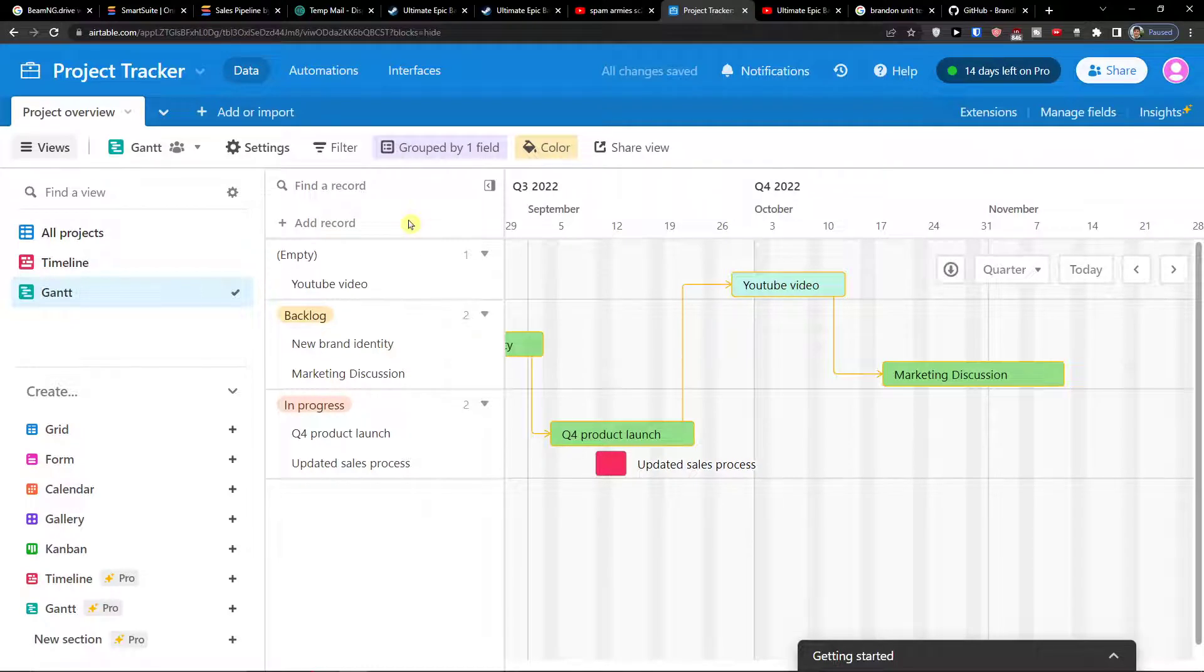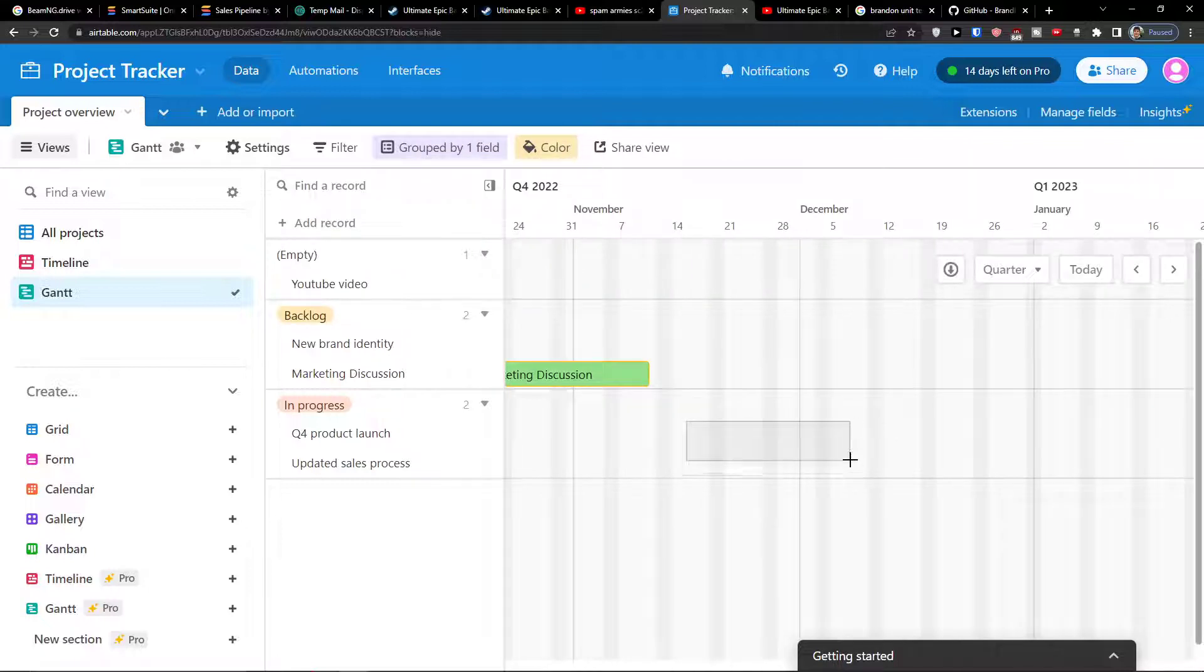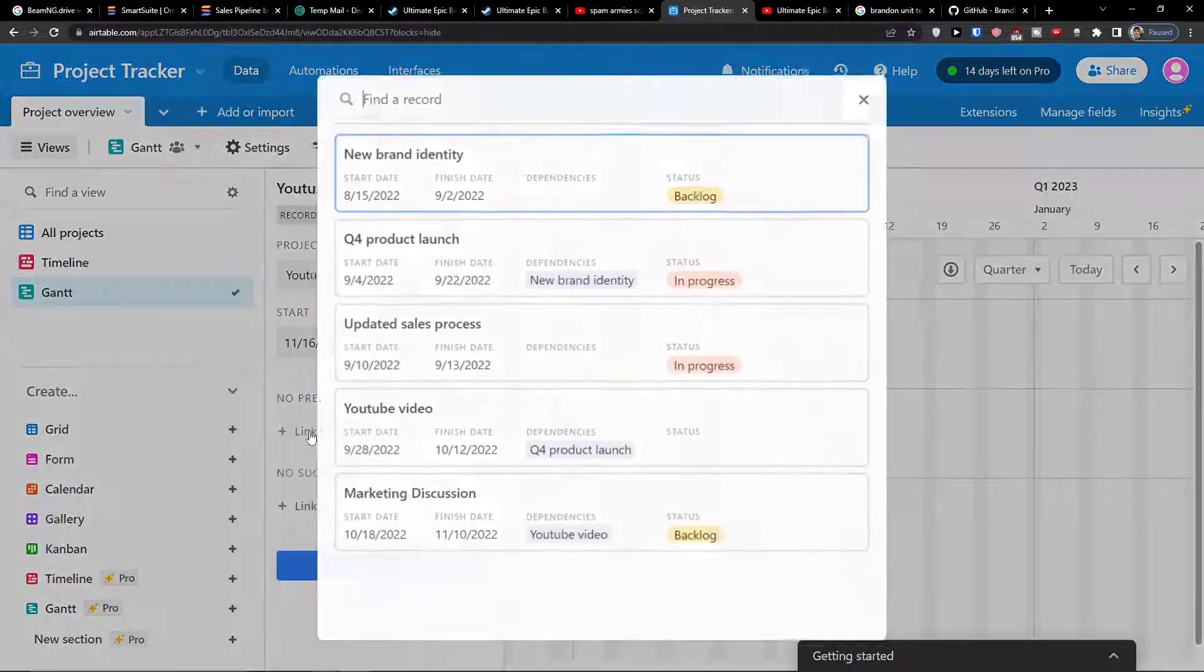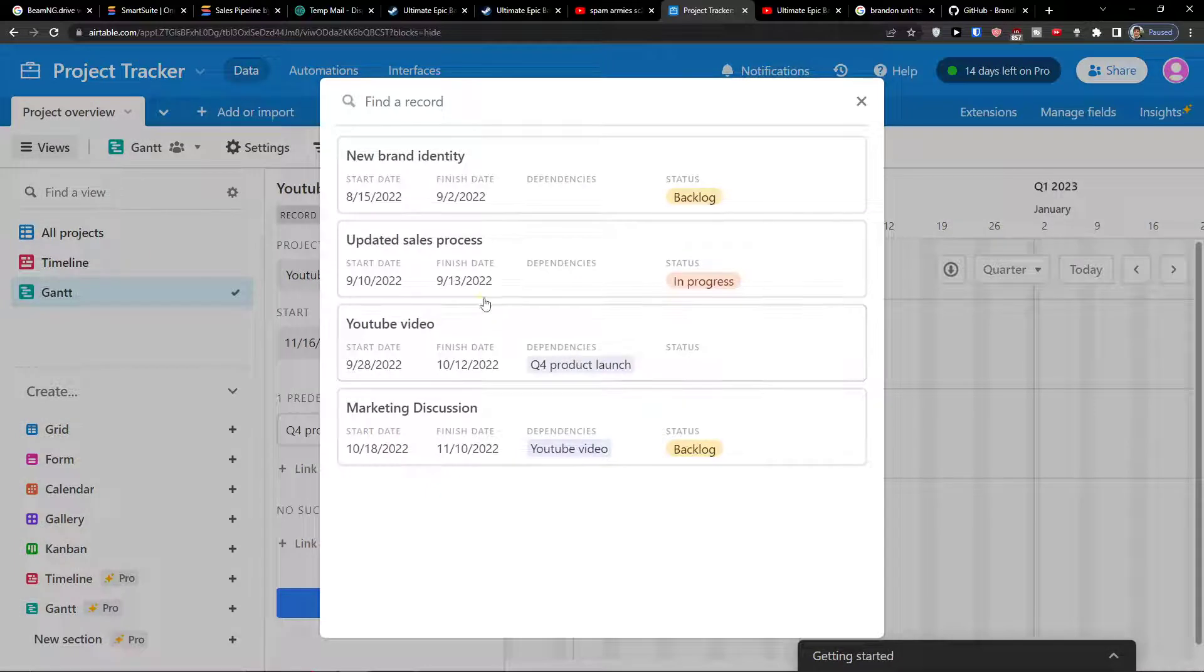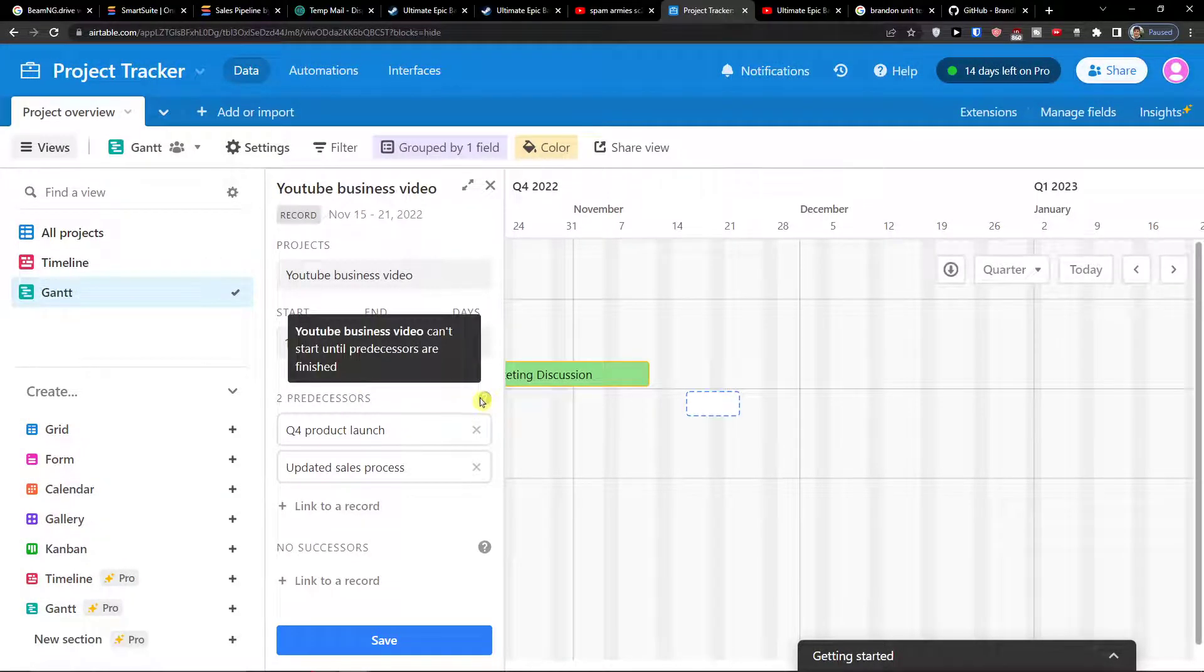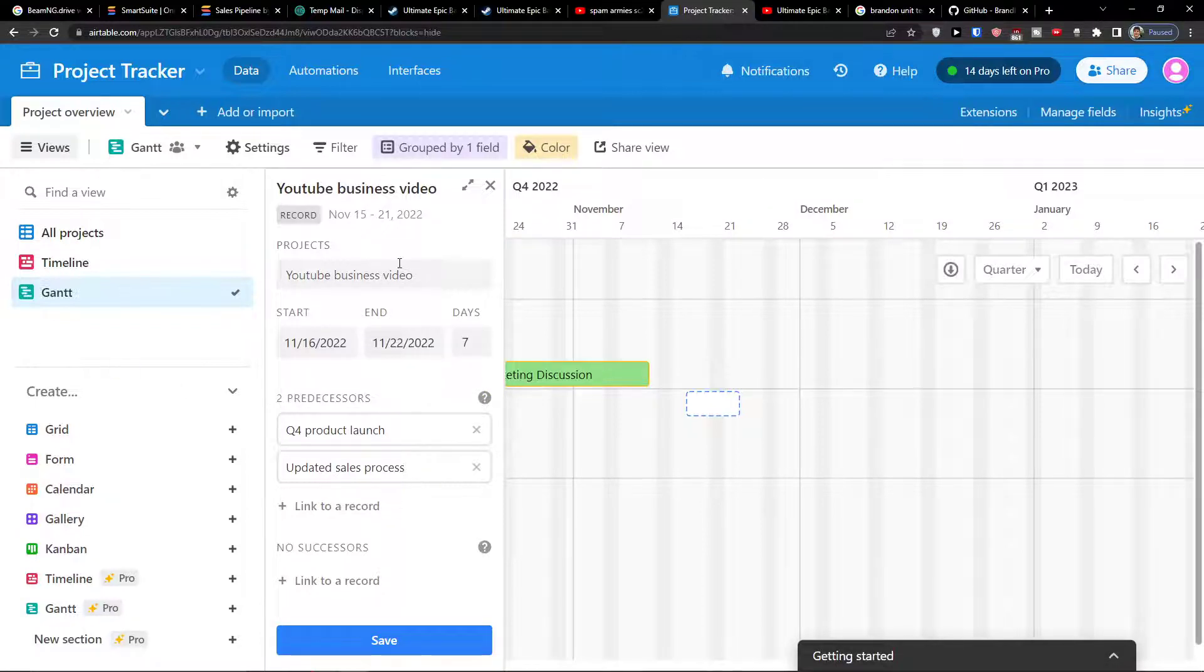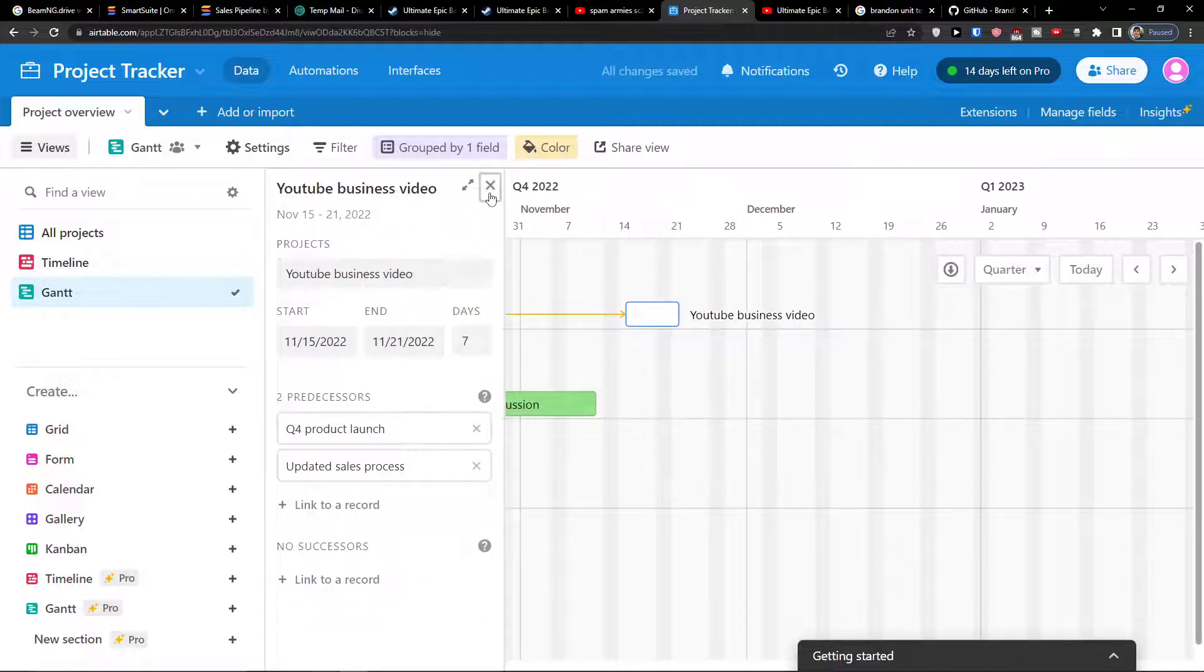And that's how you can manage it. So again, you can group it, change the color. You can create a task like here, a record. I can label for new record, YouTube business video, start ends. And then let's say I can have a predecessor which is going to be Q4 launch. Then I can link it to a different record, update sales process. So we can have multiple predecessors. And it can start until the before is finished. This is really great. So let's say you have programmers and you can't start designing something when you don't have an idea of how it's going to be. So the designers are waiting until the idea makers are going to create an idea of what kind of game it should be. And now I can click save.